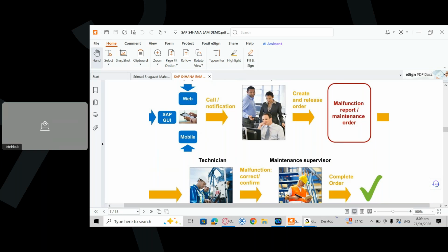One more thing: in many companies, if they don't want to use MRS, or if they don't want to create maintenance orders individually, let's say you have an outage project, it has maintenance orders in bulk, thousands or 100,000 or 200,000 orders you need to create in one go, right? So one provision is you can directly create them based on the maintenance plan, so that it will trigger, and then later on you can assign them to your project or to your revision. But in many cases it may require uploading manually.